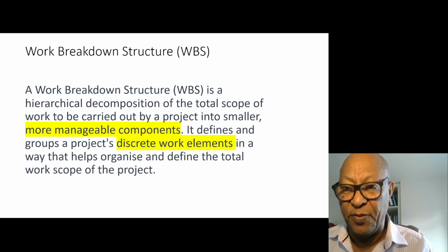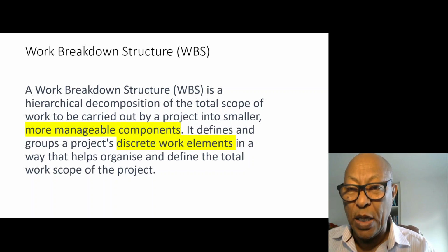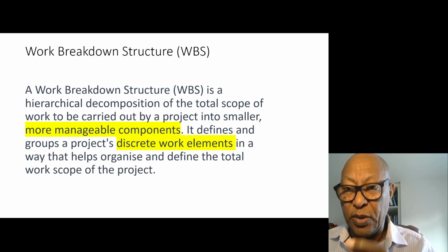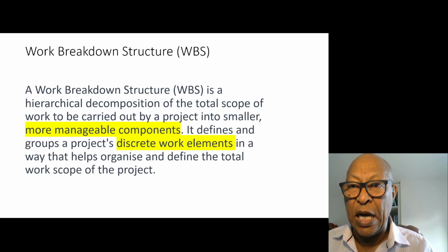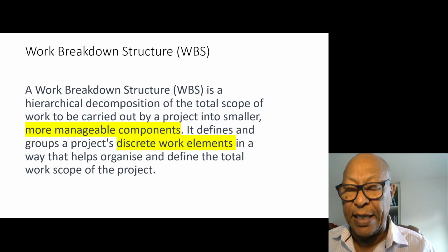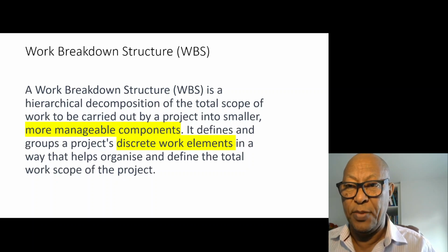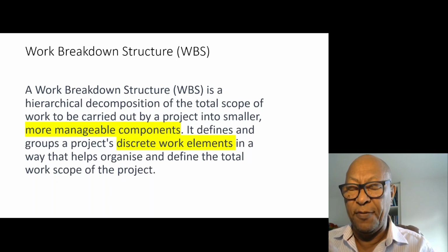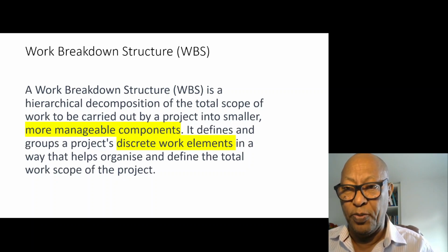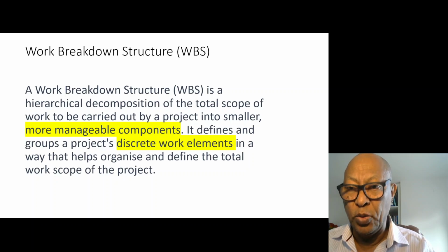In the previous cases, we asked what are really the requirements to produce P1, how many resources are really required, what kinds of skill sets are required, and how long it is going to take. That is defined in what we call a work package. That work package can be allocated to teams or to an individual with the responsibility to complete it on time with the given resources.